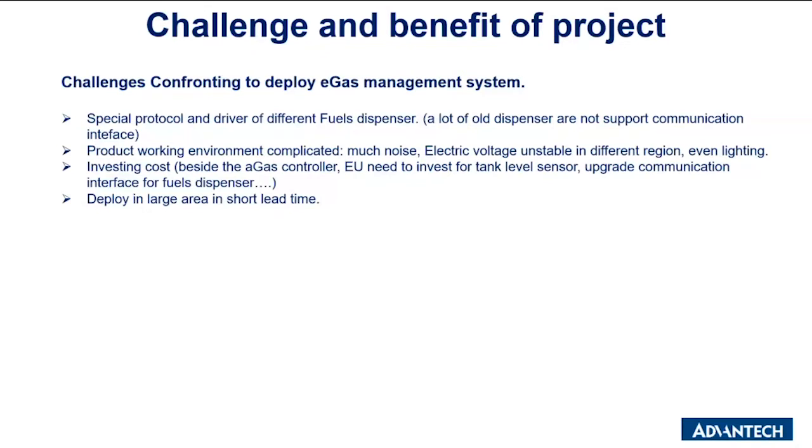That is related to the cost. Another thing is that the project was deployed over a large area in a short lead time. PLCom took only 2 years to deploy 2,700 stations across the whole of Vietnam.